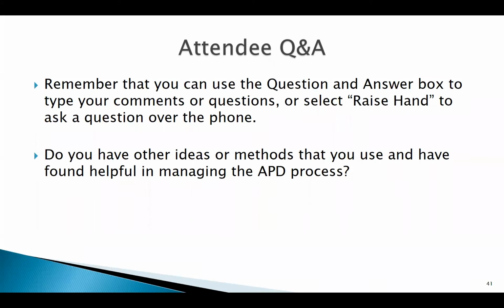The first question that I want to ask is, do you only do an as-needed APD for an implementation APD, or would you also possibly do an as-needed APD for an operational APD? Thanks, Nick. I thought I answered it in the chat as well, but that applies to both an OAPD or an IAPD. It's anytime there's a change in the system's scope, concept, cost, schedule, cost allocation methodology, or project acquisitions.